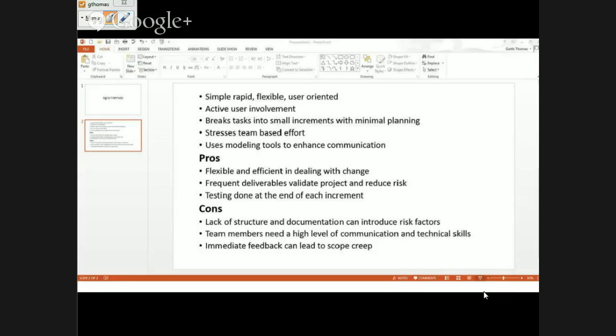So have you noticed with these three methods, although popular methods, we miss that whole documentation piece, right? And there's a lot of control that comes from that documentation. A great example would be if we're designing a product that needs a back-end database and I haven't delivered to the database programmer a data dictionary, I leave a lot of things up in the air for that person or that team of programmers to decide what my product needs or what my software needs, right?